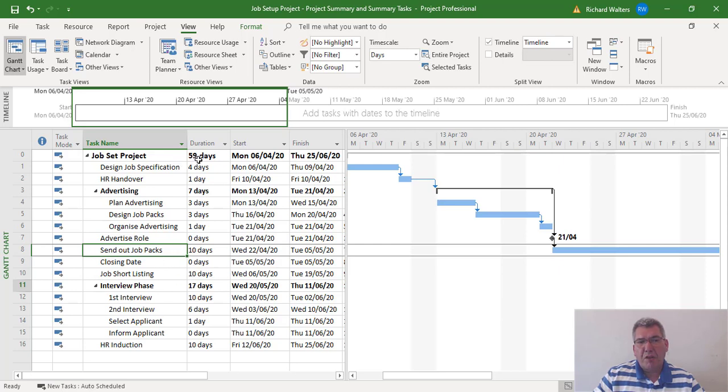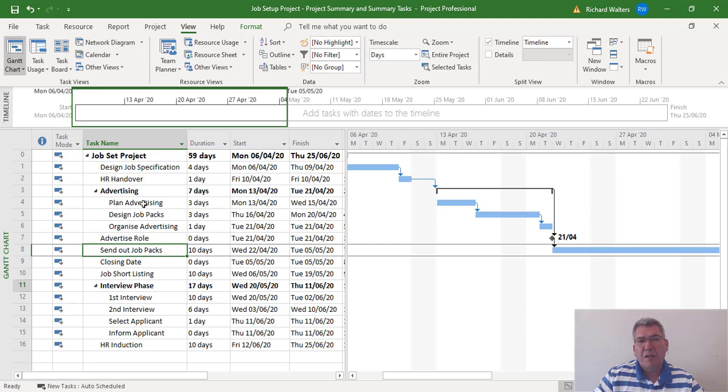Now if we look at the project duration of the project summary task, we might want to enter a new task, say for example into advertising. In this case it's a market research task, so we want four days for market research to go in above plan advertising, and for it to be a finish-to-start link with plan advertising.